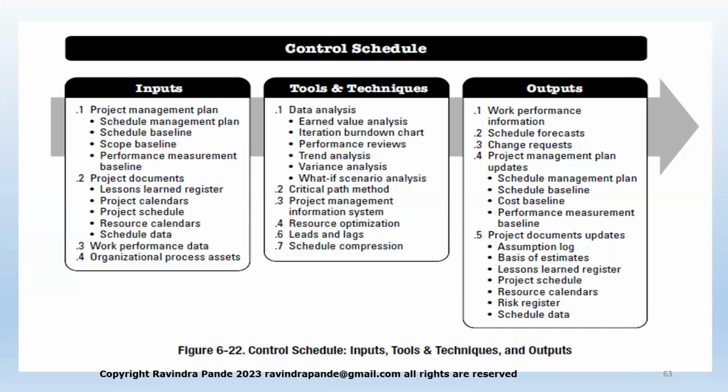And of course, we have studied the leads and lags in terms of the critical path method also. So we'll concentrate ourselves as a project manager on all the critical path, so that that path must not get delayed, must not get diverted. And that's how we basically keep our project on track every time, everywhere. And then in case, God forbid, if we are delayed by a day or two, we might do a kind of schedule compression. So we might request some extra resources from the resource management team for a few days and get the project on track.